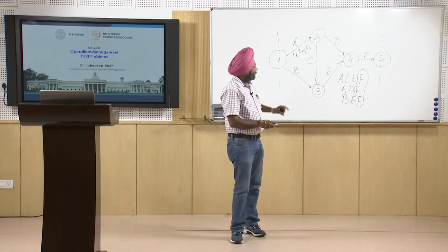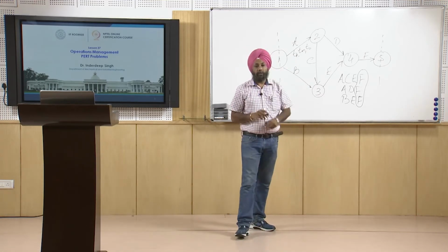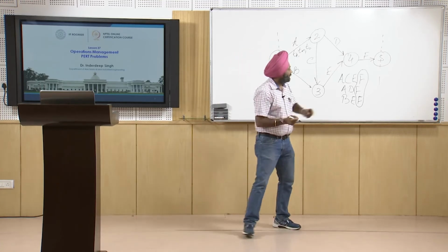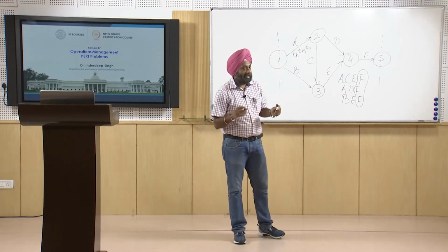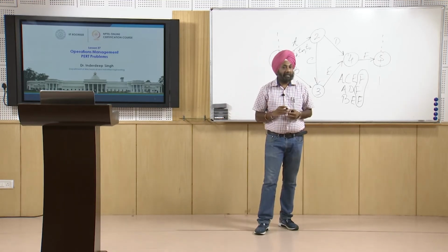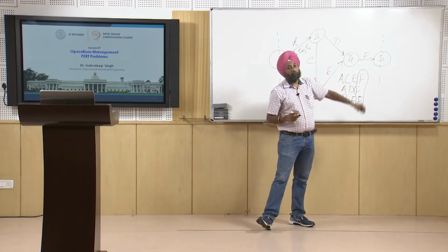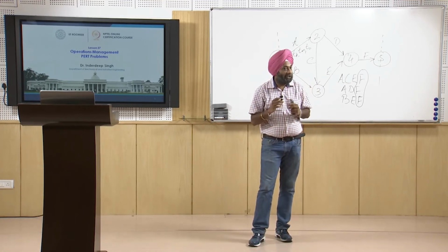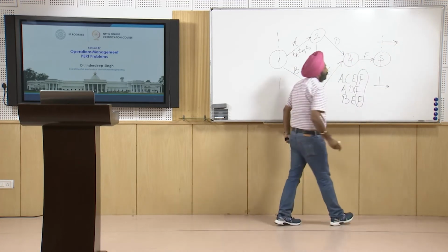So we can say that if we do the simulation using different time estimates for each activity, if we run maybe 500 simulations, activity F will always fall on the critical path. So the criticality index for activity F can come in the simulation as 1 or the highest, and the activity with the highest criticality index we always have to consider. We have to always focus on that activity, because any delay in this activity will delay the overall completion of the project.